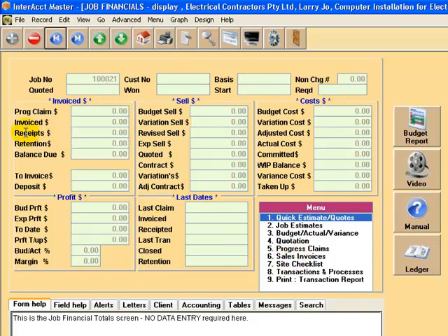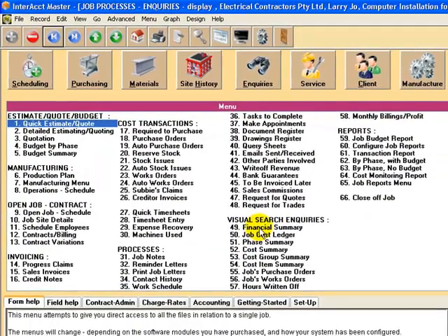And indeed it integrates with the accounting system, so when you get cash receipts in relation to this job, they'll post automatically here. And indeed any retentions in regard to that will show, plus the retention due date down here under the dates area. And so there is a little mini debtors record inside the job itself that shows you the balance due and what you get to invoice based on the costs and the markup on those costs in terms of the expected sell price. So it's a very nice way of seeing all these grand totals, and once again, if need be, drill down into the detail. Alright, I'll go just back one step to the transactions and processes screen.